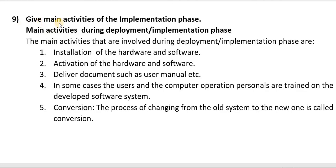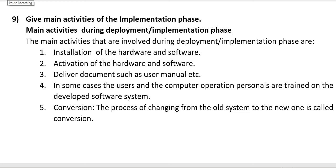Question nine: Give the main activities of the implementation phase. The main activities during the deployment or implementation phase are: 1. Installation of the hardware and software. 2. Activation of the hardware and software. 3. Deliver documents such as user manuals. 4. In some cases, users and computer operations personnel are trained on the developed software system. 5. Conversion — the process of changing from the old system to the new system is called conversion.